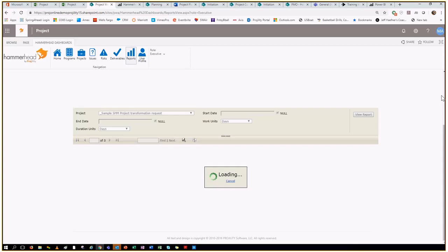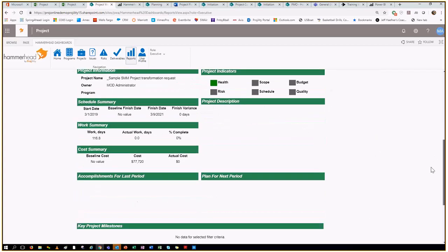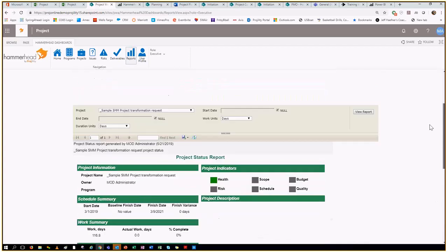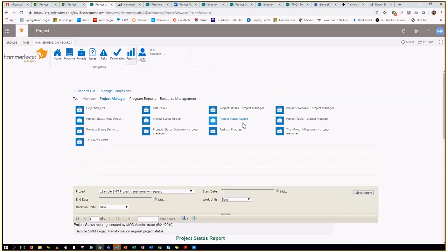And now I'm doing integrated status reporting, moving project managers away from looking for documents and filling in data, to actually selecting a status report and running that. Then, again using Office 365, they can export that to a PowerPoint, to a PDF, maybe a Word document, and share that around. Or I can automatically subscribe to these, and they can send these out and put them in end users' email boxes every Monday. Also put it on the SharePoint site, the collaboration site, for that particular project. So we're doing integrated status reporting right from within Project Online as well.